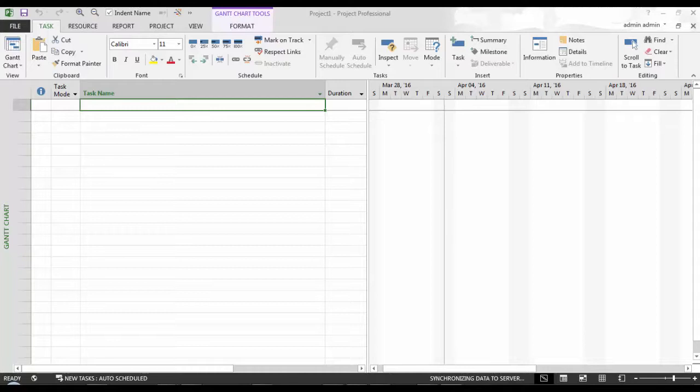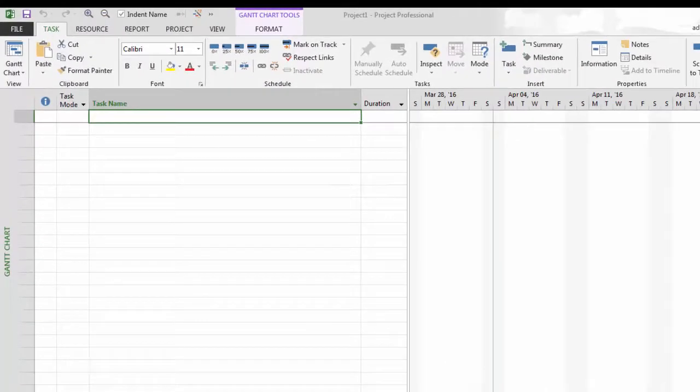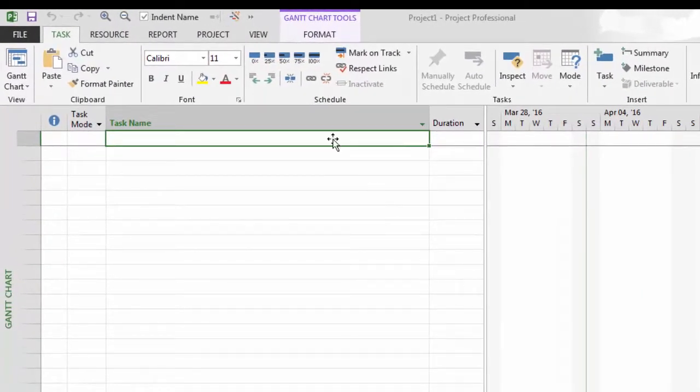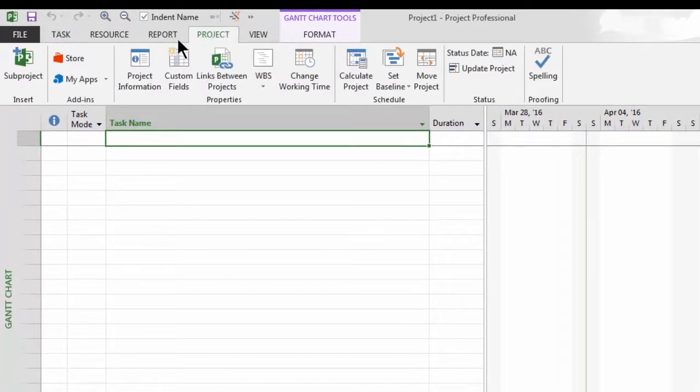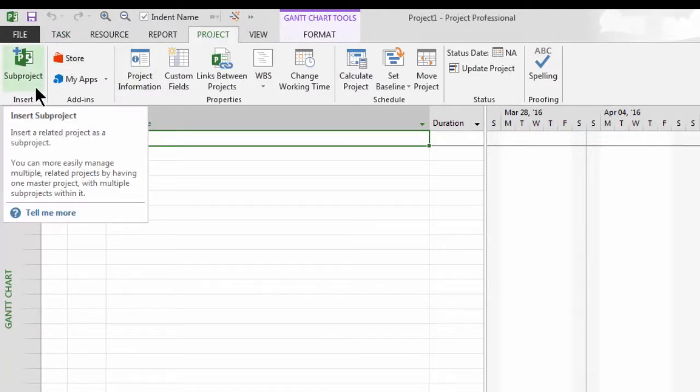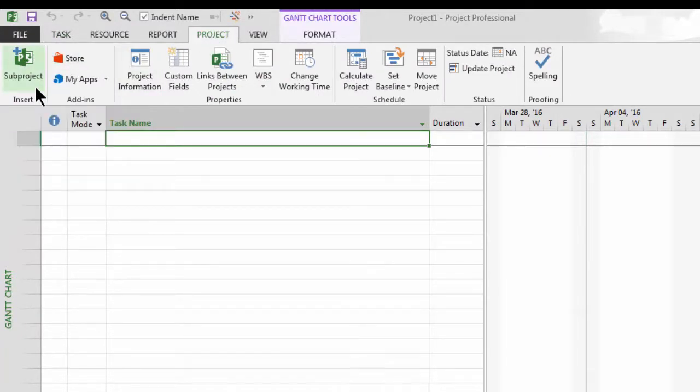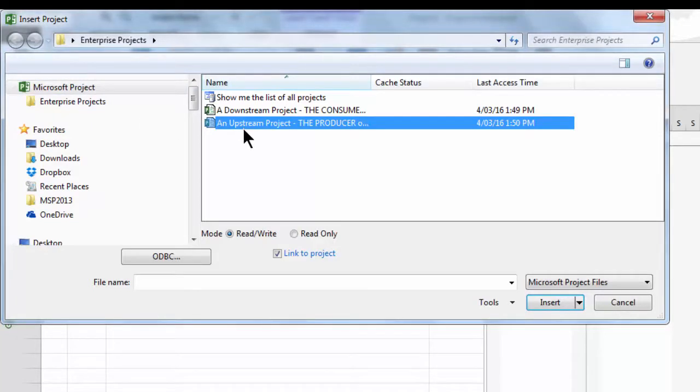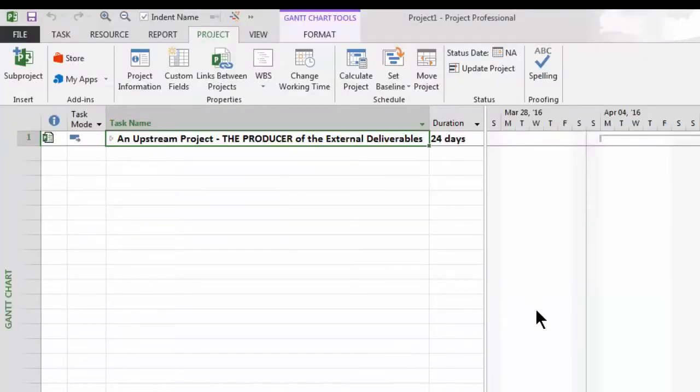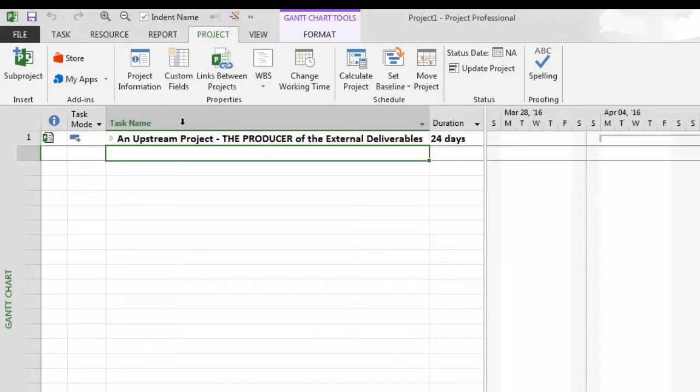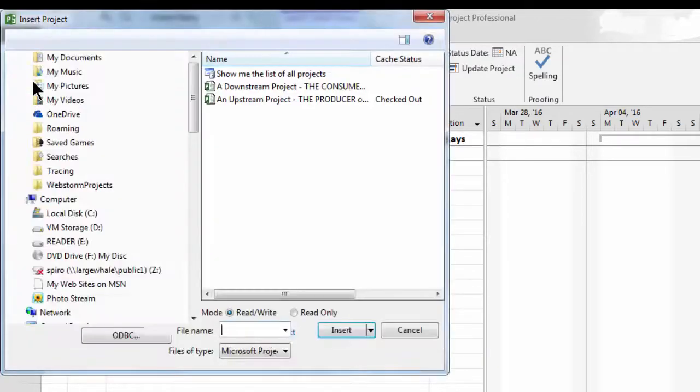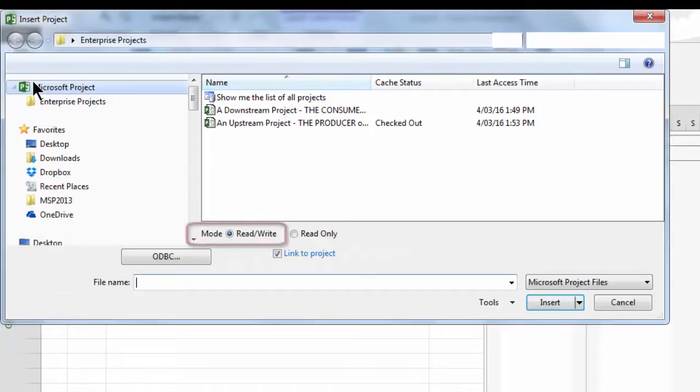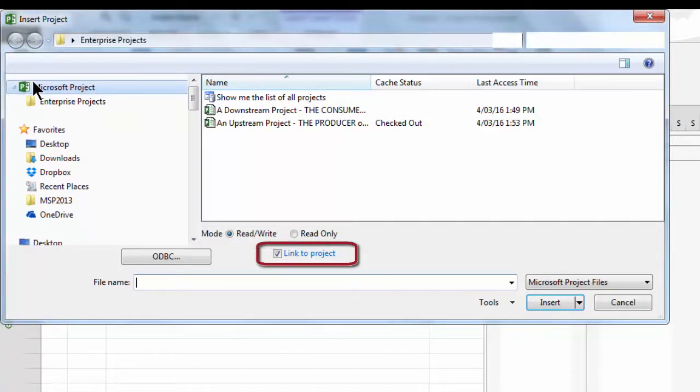I will go ahead and open up our files within this currently blank project file. I have conveniently named my files an upstream project, the producer project, and a downstream project, the consumer of the external deliverables from the server. To insert my project files, I will need the project ribbon where we will find the insert group containing the subproject button. Then, I'll find and will select and insert each of my files in turn. When doing so, we ensure that they are set up for read-write mode and the link to project checkbox is selected which happens to be the default settings.